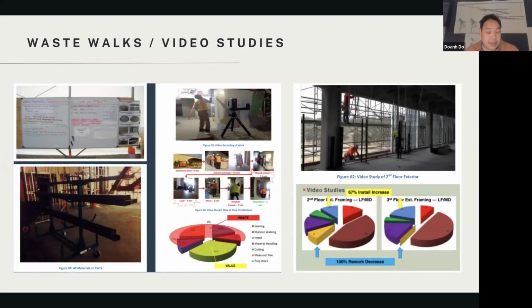Either way, as long as you have the videotape of the work, because when you're doing the work as a worker, you're not aware of your waste. If you were aware of the waste, you wouldn't make it. You're simply not aware of what's happening day to day, right? So you're just recording the work, watching the clip and saying, okay, if I take the entire work clip of like 20 minutes, what part of it is value adding, what part is waste. And simply by labeling green and red and yellow, that's the start.